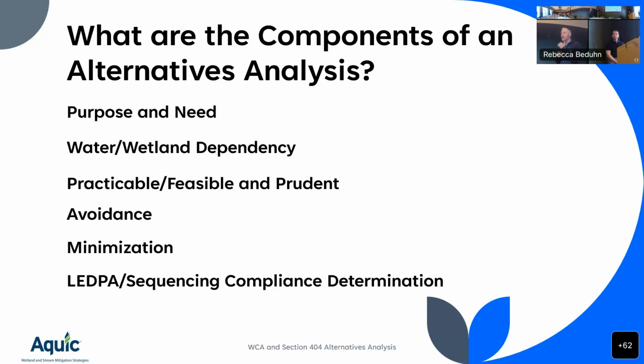So those two alternatives that you're coming up with are avoidance alternatives, right? Of course, I know do nothing is an alternative, right? But there has to be built in an avoidance alternative. So it's really important to understand where you are in the context of the rule, and then understand too that the onus is on both sides. The applicant must demonstrate. The LGU must consider. Those are musts, right? It's not may, it's a must.